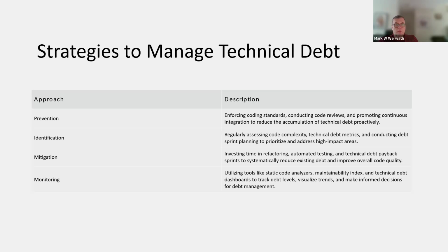In terms of monitoring, utilize tools like static code analyzers, maintainability indexes, and technical debt dashboards. So track your technical debt, make sure it's visual, so visualize the trends, and make informed decisions about debt management, what you can and can't do, what you will and won't do. And at some point, the piper has to be paid.